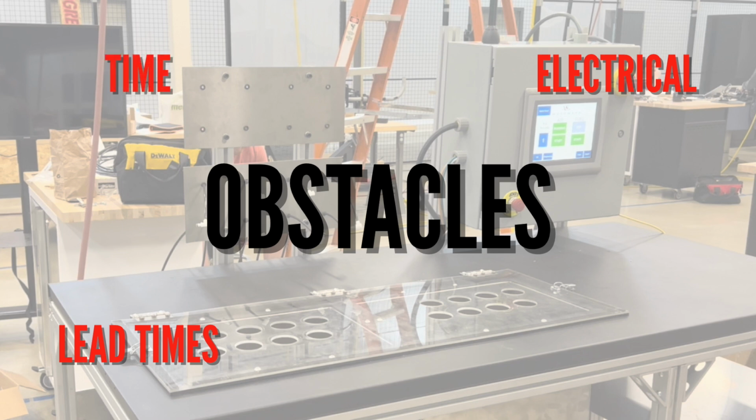Time was also a concern, as mentioned earlier, as we started a little bit later on the build than we originally intended, as well as all of us having additional classes on top of the senior project build. We definitely learned some lessons along the way as well, ordering some wrong parts that didn't work with the machine how we thought they originally would, so we had to wait a little longer to get the correct parts, and this plays into the time and lead times issues we experienced.